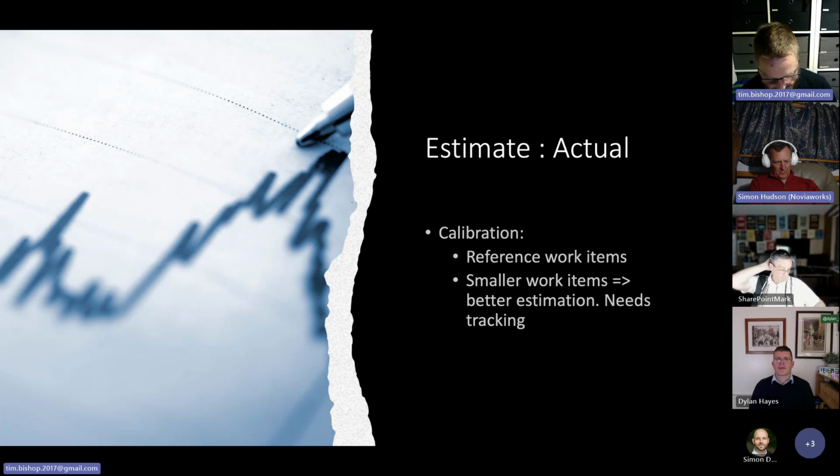So the facetious answer is that the work that goes into reporting it properly is considerably less than the amount that you will lose when it goes horribly wrong. That's a facetious way to put it. It should be really, really effortless. A typical daily scrum is only 15 minutes a day, and the proportion of the team's time that they should spend on planning and reporting to themselves is only 10%. Most teams I've worked with is 3 to 5%. So it's tiny when you bear in mind that if you never check in on yourselves, you can waste 50 to 70% of all the money and time that goes into the project. So spending 3 to 5% making sure you're still on course should be nothing.